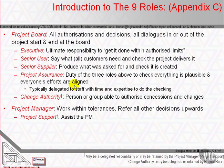The project manager has the authority to run the project on a day-to-day basis on behalf of the project board within the constraints laid down by them. The constraints are expressed by the six forms of tolerance: time, cost, scope, risk, quality and benefits. The project manager's prime responsibility is to ensure that the project produces the required products within the tolerances. The project manager is also responsible for the project producing a result capable of achieving the benefits defined in the business case.